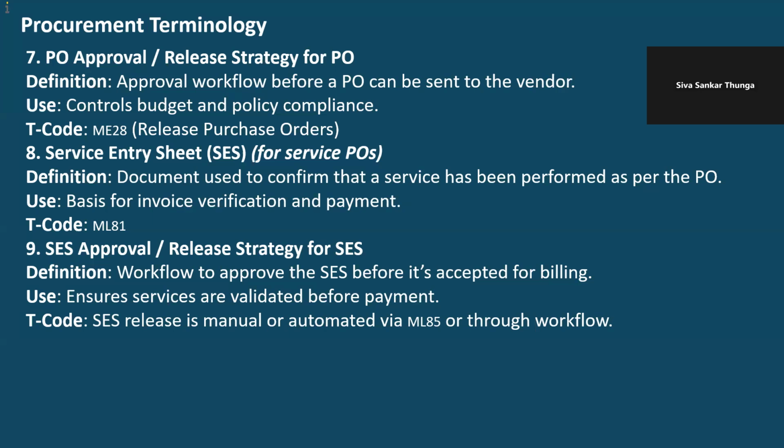distributor submitted. Similarly, in case of projects also, based on the service, for example, assume that for the painting we gave to an external vendor. Painting, we don't have our own manpower. We agreed on a square feet basis. We will pay something like 250 rupees per square feet, assume.